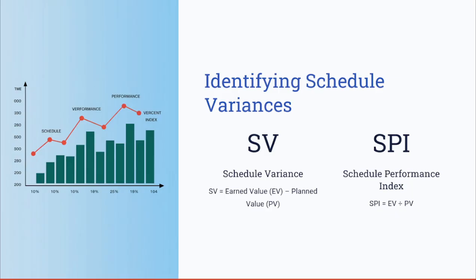The common causes of schedule variances include maybe underestimating the task duration. So, in case you are faced with an issue where you have underestimated the schedule, and you have seen a big variance in your schedules, comparing the planned with the actual time needed to complete that task, the first common cause here is the underestimated task duration. Next, you have unexpected delays, such as resource shortages, and sometimes you might also face some scope changes that could affect the schedule.